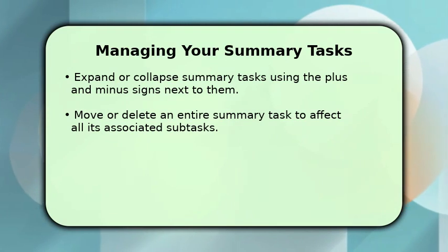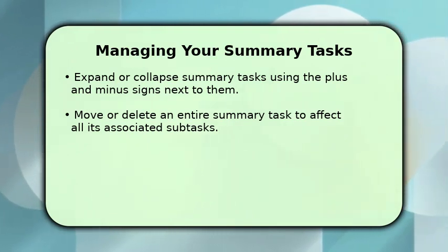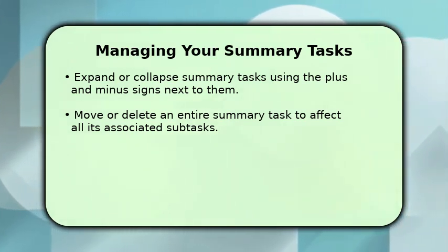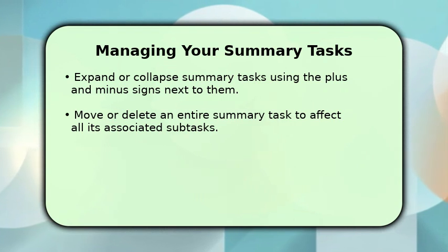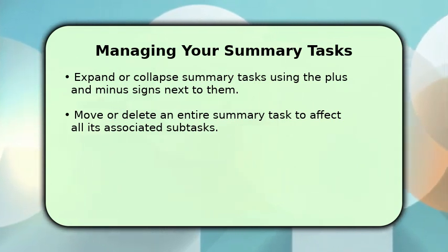Once created, managing your summary tasks is straightforward. You can easily expand or collapse them by clicking the plus or minus signs in the Gantt chart view. This allows you to switch between a detailed and a high-level view of your project.